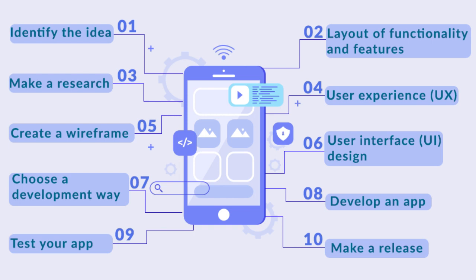So let's bring this to life with a real world example. Imagine you are developing a new app. Your objective is to launch it in 6 months. Your WBS would include tasks like designing the UI, coding, testing, marketing, and final delivery to your customer. You will create a timeline for each phase, allocate your team members to their specific tasks, and plan for potential risks like bugs, delays, or unavailability of certain resources or some key member.